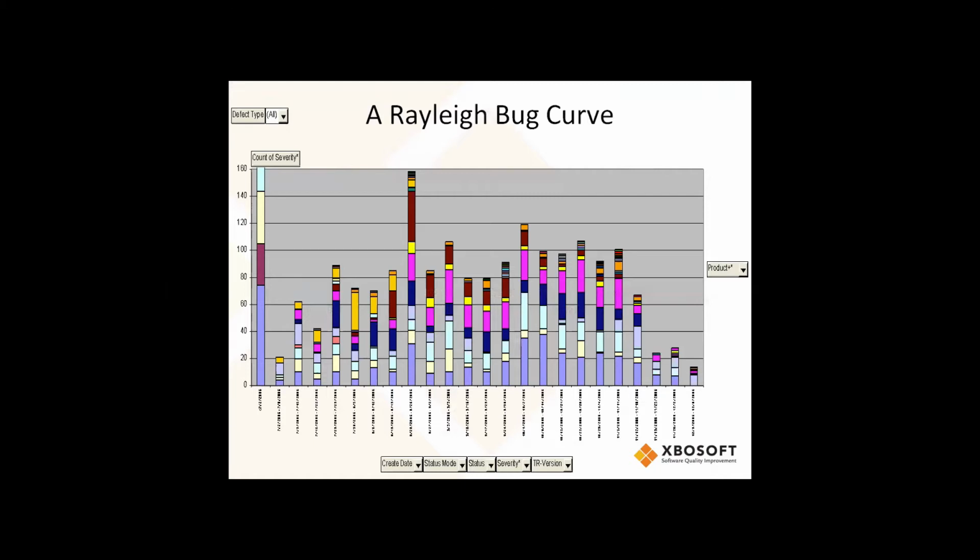Now, all knowledge-based systems under development exhibit this curve when it comes to, say, bugs, whether you're building a nuclear submarine application or a widget for a credit card swipe. Typically about two-thirds, three-quarters of the way into the curve, 70% in, where the remaining 30% is QA and regression testing, we're on the tail end of that curve after reaching a peak.